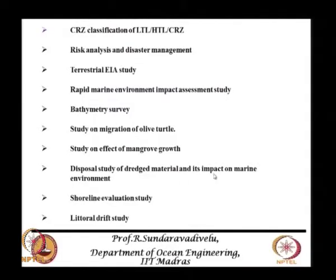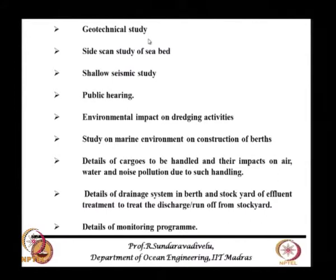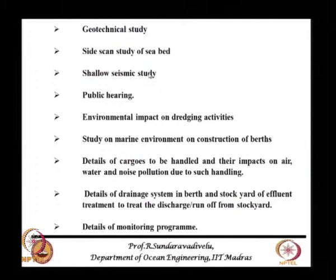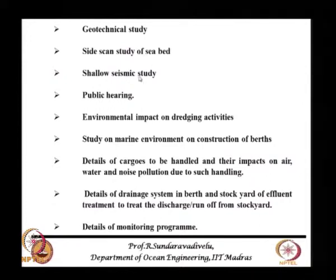Then, disposal study of dredged material and its impacts on marine environment. Then shoreline evaluation study and littoral drift study. These are very important studies. Additional studies include geotechnical study — meaning borehole investigation — side scan sonar study, and shallow seismic study. These studies can be done in an area of about one square kilometer, costing about 10 lakh rupees each. Geotechnical studies, such as marine borehole investigation, will cost about 1 to 2 crores. These are done at the DPR stage.